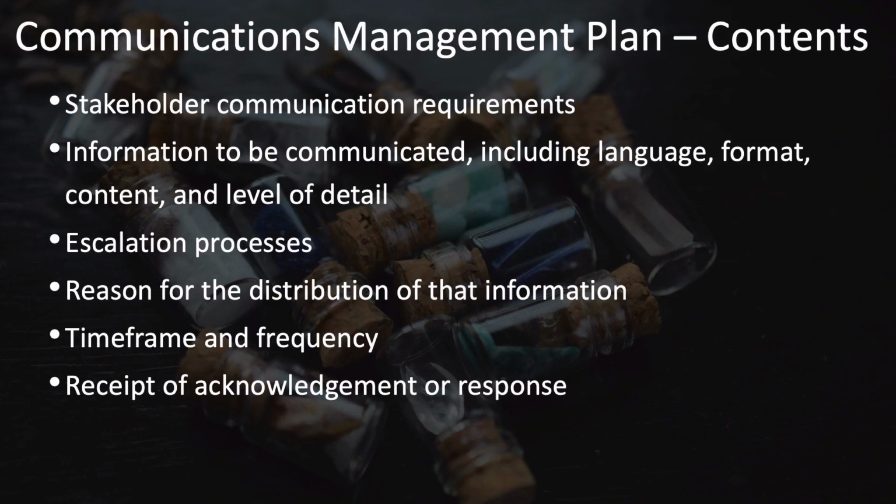Your communications management plan should also include definition of your escalation processes. If you have issues that come up that need escalation, how will you handle those? It's best to have this defined up front rather than doing it ad hoc as the need arises. It is very helpful to also list the reasons for the distribution of the information that you'll be communicating. This will help you during the project to make sure that you stay aligned with the purpose of this communication, and you can evaluate better whether or not the need is being satisfied.